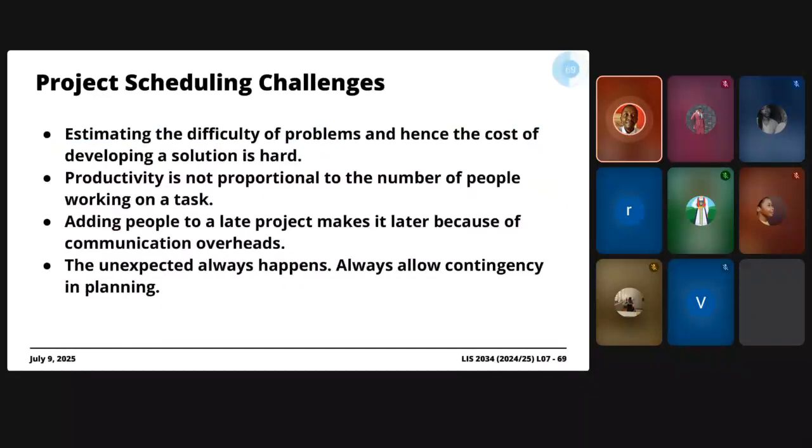And what we realized is that once we have that information, then for each of those different things we've decomposed, we attach important information such as a unique identifier for that activity or task, the ID in essence. Of course, we'd already have the name at that point, but we also have got to indicate when exactly we're going to start working on that item.